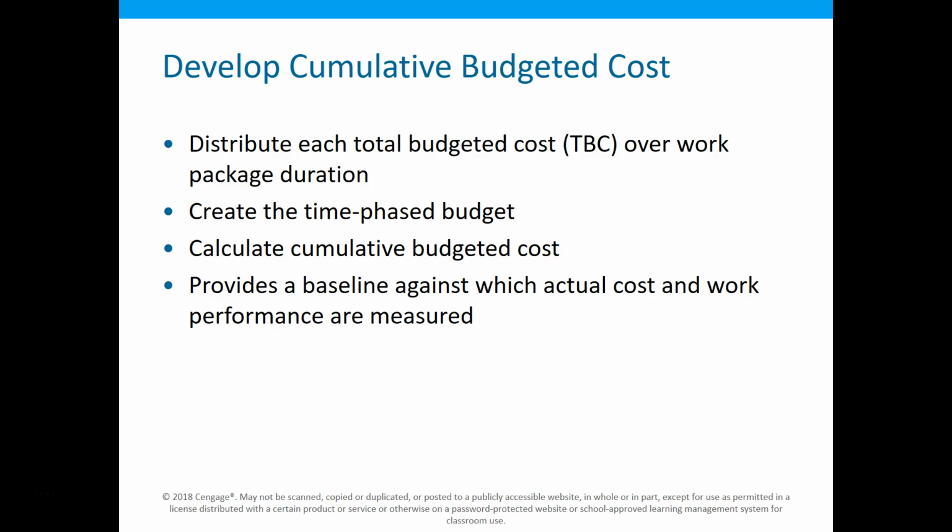So if I'm doing a project that has a lot of materials involved in it, oftentimes that budget starts very high because we have to purchase all those materials. So at the beginning of our project, that first initial month or whatever, we break our project down into time phases, it takes a lot of money in that initial phase. And then as the project goes along, we reduce the number of workers, and finally it tails off at the end. There are other projects, depending on that structure,